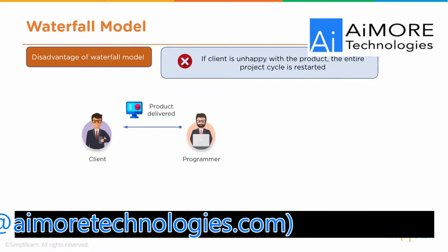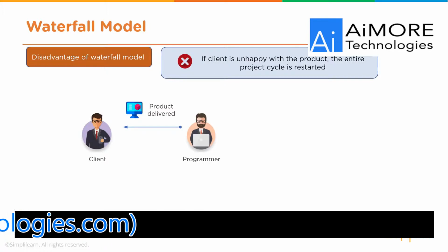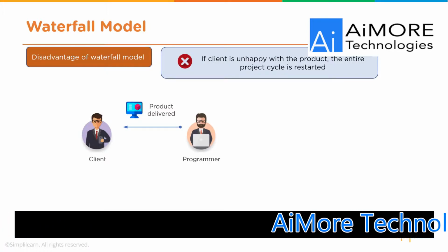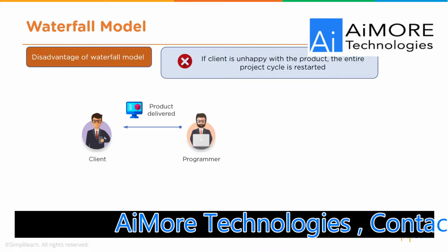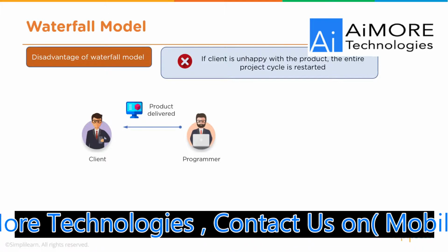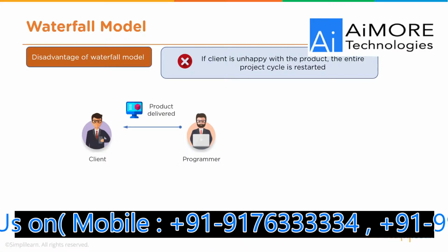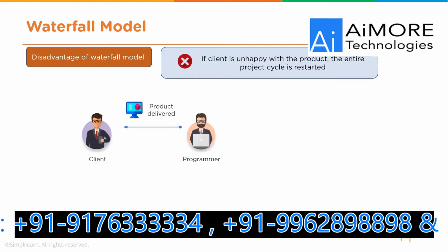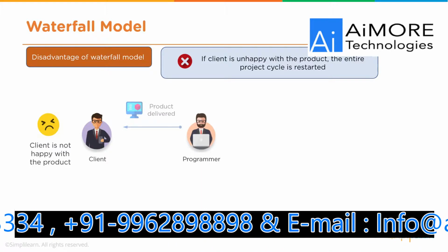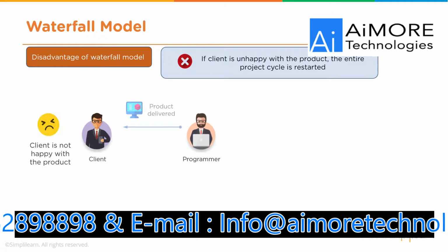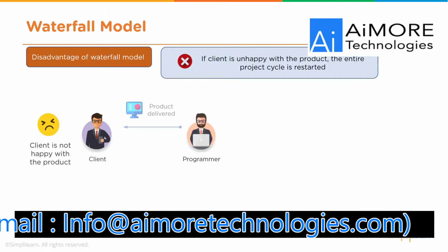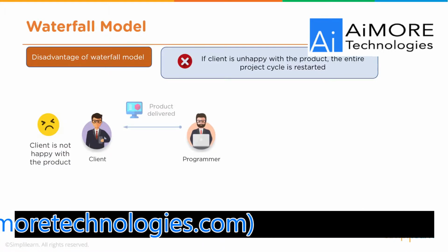Also, if you spend weeks and months away from your client and you deliver a solution that they are only just going to see after you spend a lot of time working on it, they could be pointing out things in the final application that they don't want or are not implemented correctly or lead to general unhappiness. The challenge you then have is if you want to add back in the client's feedback, you have to restart the whole waterfall cycle again.